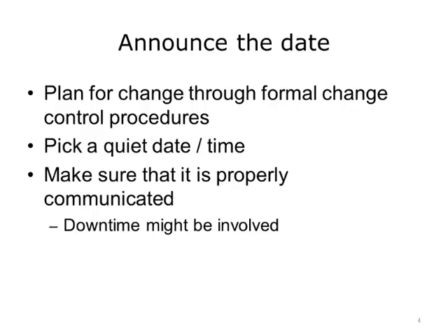Whenever a change is made in an IT environment, it is important that the change is coordinated with all other changes and with business operations. That is why formal change control procedures need to be followed. Change management is described in detail as part of a set of processes known as Information Technology Services Management, or ITSM. Basically, it is important to pick a time that works with everyone involved, to communicate widely about the change, and to plan for any expected downtime.